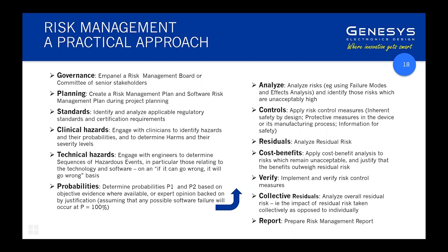So the next thing, clinical hazards. Engage with the clinicians, the experts using the device or the experts in the environment who can tell you what really, from their experience, are the hazards and hazard situations that they're concerned with. So this goes beyond the things that 60601-1 identifies, for example, electrocution, which the engineers know about. This goes into the domain of the people actually using the device clinically to know what the hazards and ultimate risks are.